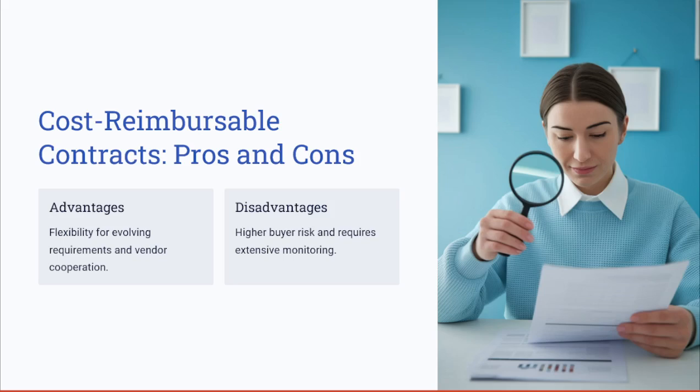To summarize the advantages and disadvantages of cost reimbursable contracts, cost reimbursable contracts allow for adaptability in project execution, making them ideal for a project with unclear scope or high uncertainty. And they encourage collaboration between the buyers and sellers, as vendors are reimbursed for legitimate costs. However, these contracts require close cost tracking and monitoring to prevent unnecessary expenses. If not managed properly, the cost reimbursable contracts can lead to budget overruns and inefficiencies.